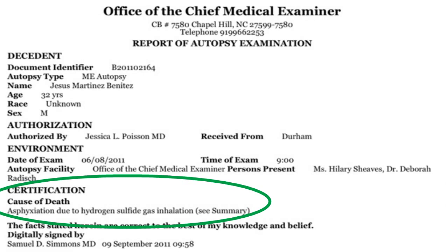And the bottom line was that the city, and this is not unusual in public works projects and municipalities and state government, also has an issue: very little pre-qualification is done, and most bids are selected solely on cost.